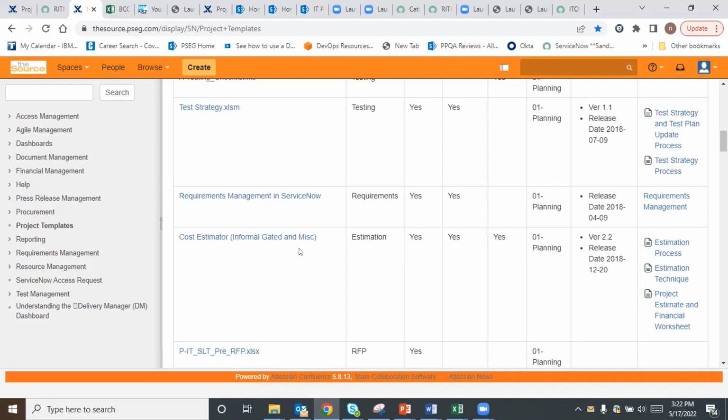So that's just a little bit more information I wanted to add. Cost estimation is going to play a big role in the project lifecycle. It starts with your business case stage, even before that, when you are estimating the rough order of magnitude, and then the same tool can be used to refine your cost estimates as you go through the life cycle of the project.